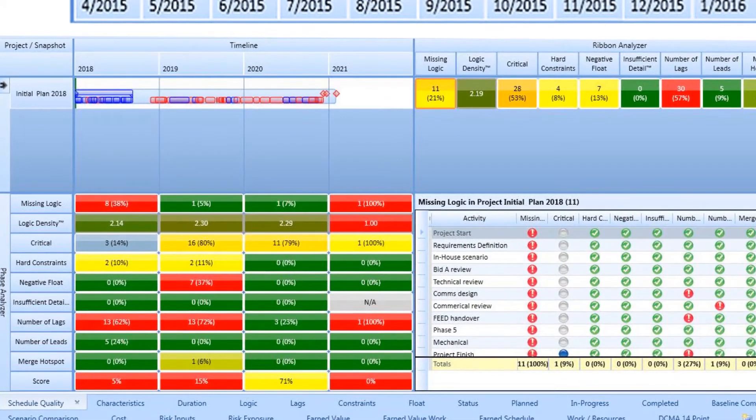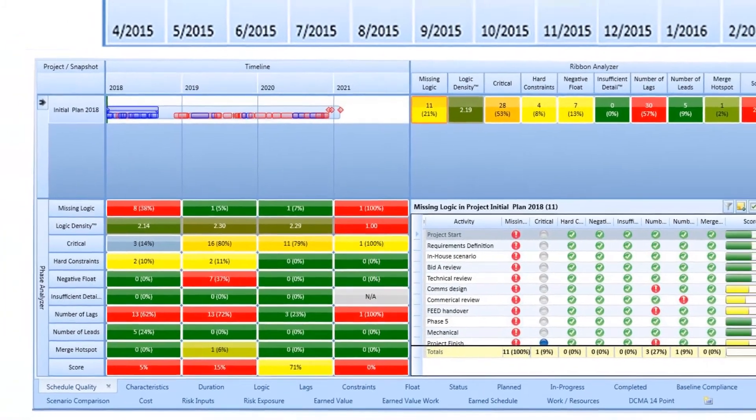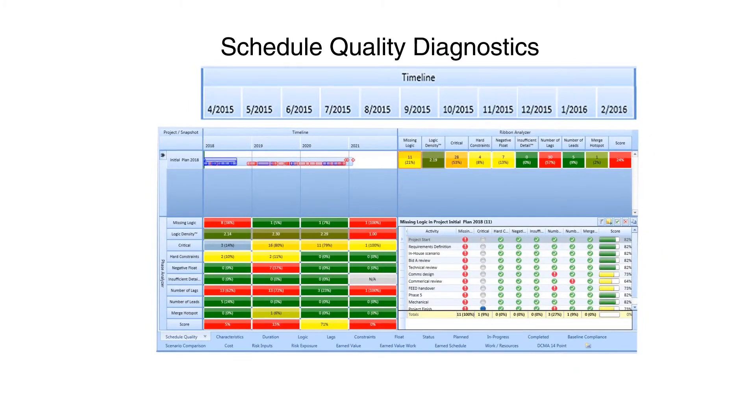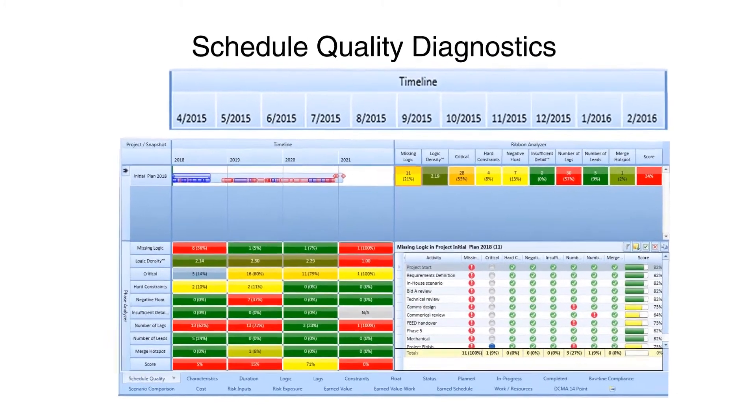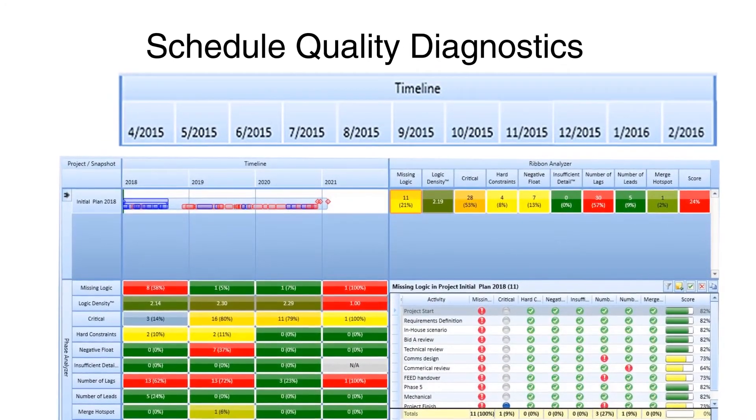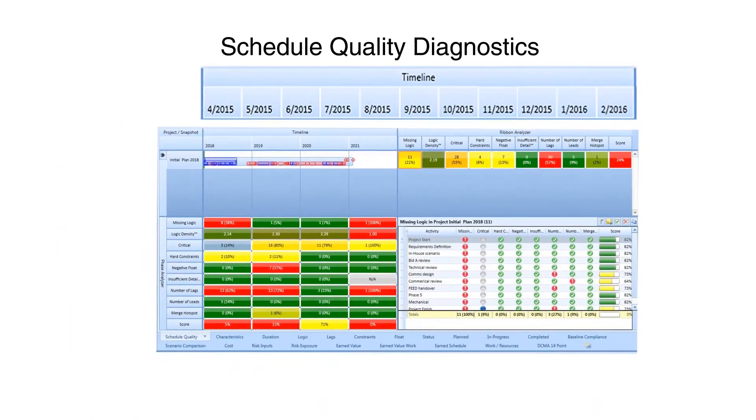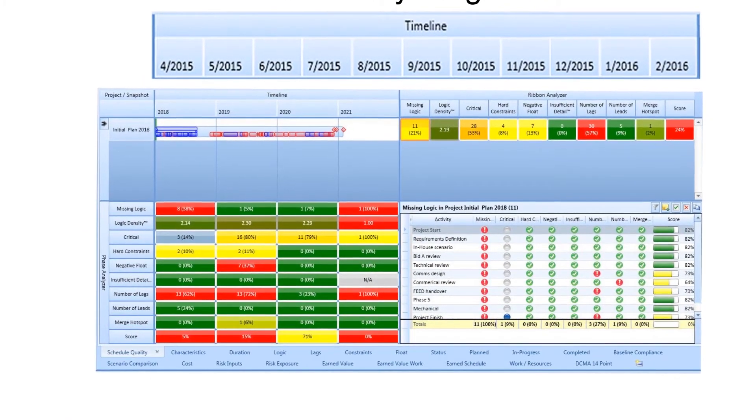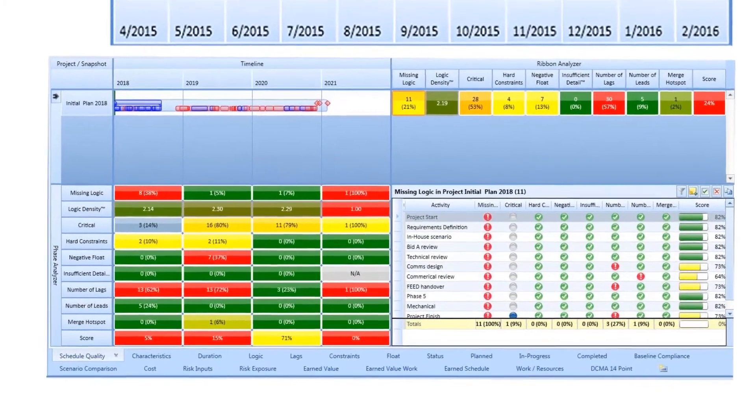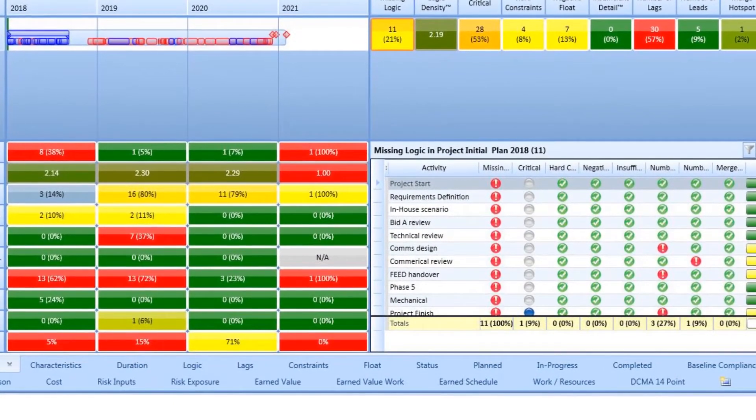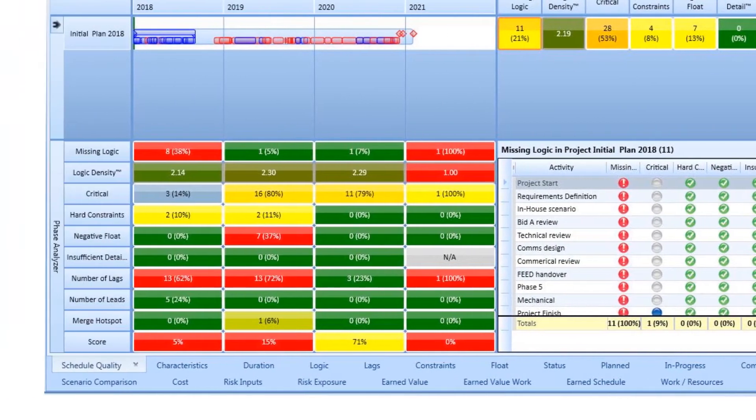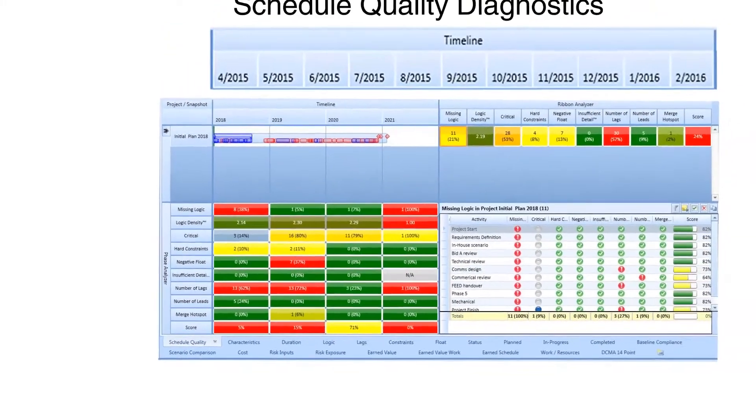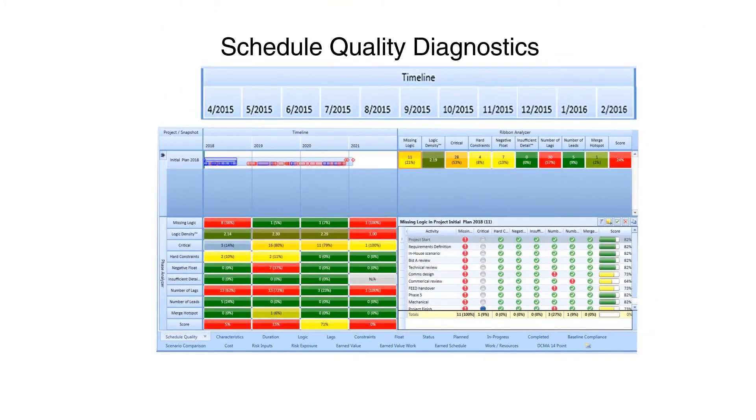No matter how useful a Schedule Analysis Tool may be, there is no substitute for the task managers taking ownership of the IMS and ensuring that it is in good working order. For example, Analysis Software can be used to check to determine if a task has a predecessor or a successor, but only someone familiar with the effort can determine if a task has the correct predecessor and successor. Analysis Software is becoming more and more sophisticated, but people still control the success or failure of the project.